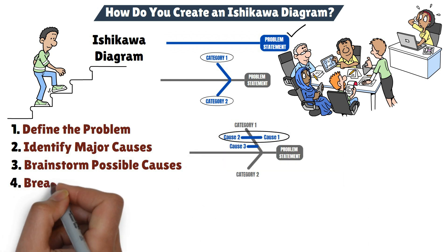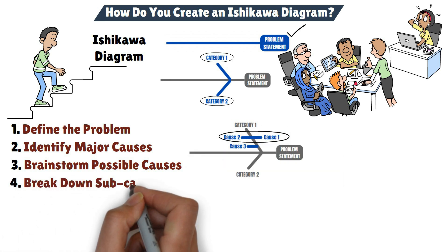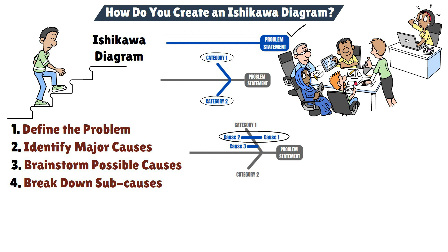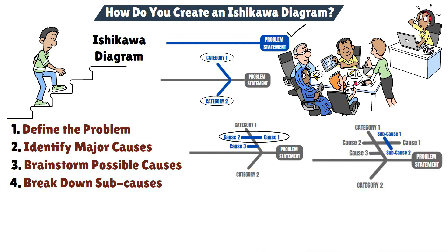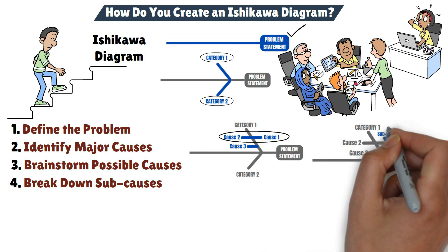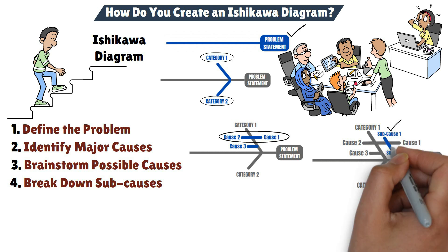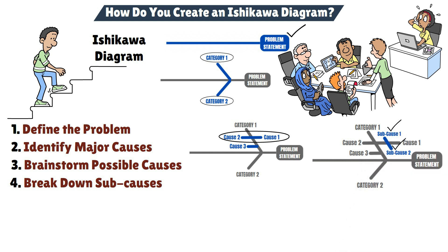Step 4: Break down subcauses. Don't stop at just one level of causes. For each cause you identify, dig deeper to uncover potential subcauses. Keep going until you feel you've reached the root cause of the issue.